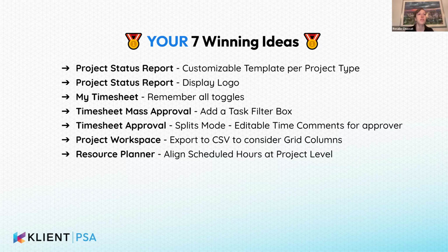And then the last one for the resource planner, maybe Yanick, you can talk to that one a little bit. Yeah, so in the past, as you know, you have an estimated number of hours, for example. You can log time on a task, and quite often, let's say you're scheduling somebody to work on a specific week on some task, but they don't do their entire work. You can always overschedule or underschedule. And the functionality we had in the past is that you can align the scheduled hours with the logged hours, meaning that you have that remaining bucket of scheduled hours that are left to be rescheduled. You could only do it on a task by task basis in the past. Now we're going to also do it on a project level. And we're going to provide you even more options.